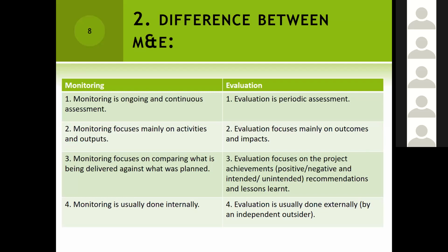It's something that we assess at certain periods, maybe at the end of the month or at the end of the quarter or halfway through the project or at the end of the project, like the end-term evaluations that we normally do. This is very different from monitoring, because monitoring has to be done continuously as the project continues.